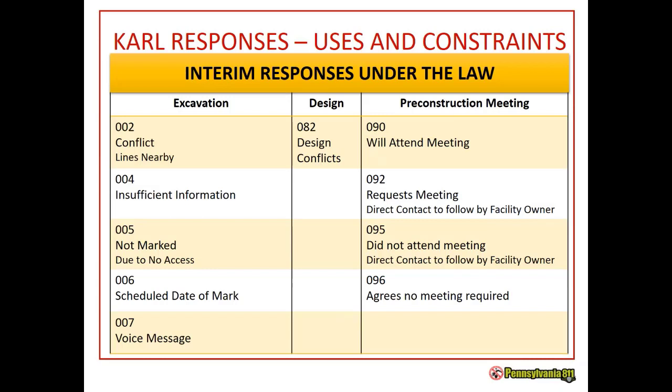Again, if there's an interim response that isn't on the standard list, but you feel is necessary to convey to the excavator, this temporary message will be saved for 30 days, but again, you will have to update with a final response.